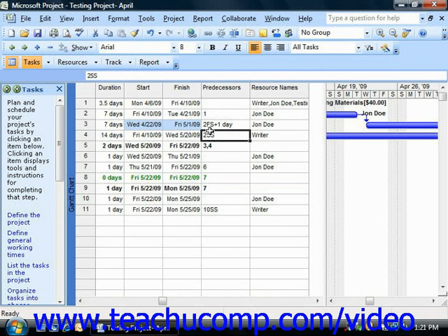By default, Microsoft Project creates tasks with flexible constraints to allow for maximum flexibility in rescheduling. However, you can set the constraints for a task as needed to produce semi-flexible or inflexible constraints. Now, in Microsoft Project, the available task constraints are grouped into three main categories. You have flexible constraints, semi-flexible constraints, and inflexible constraints.